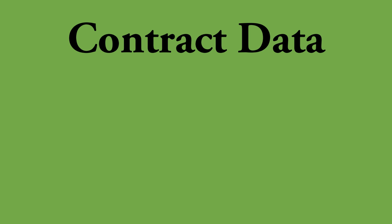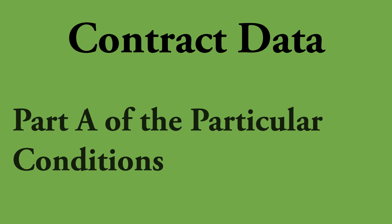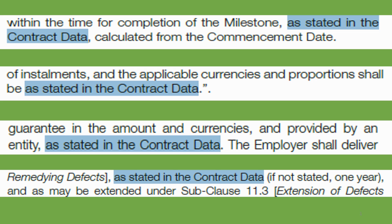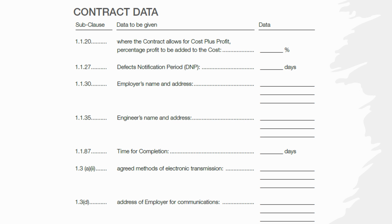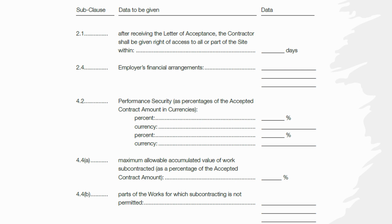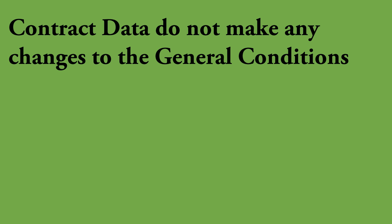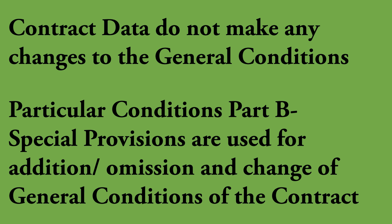Now let's talk about 'contract data'. Contract data is Part A of particular conditions, and it acts as a link between general and particular conditions. When you go through general conditions clauses, you will find references that say 'as stated in the contract data', meaning certain sub-clauses in the general conditions require specific information. You can find all the project-specific information under contract data, such as employer's details, time for completion, advance payment percentage, and retention amount percentage. Remember that contract data does not make any changes to the general conditions in FIDIC. If you want to change any sub-clauses in general conditions, you shall do it using particular conditions Part B, special provisions.